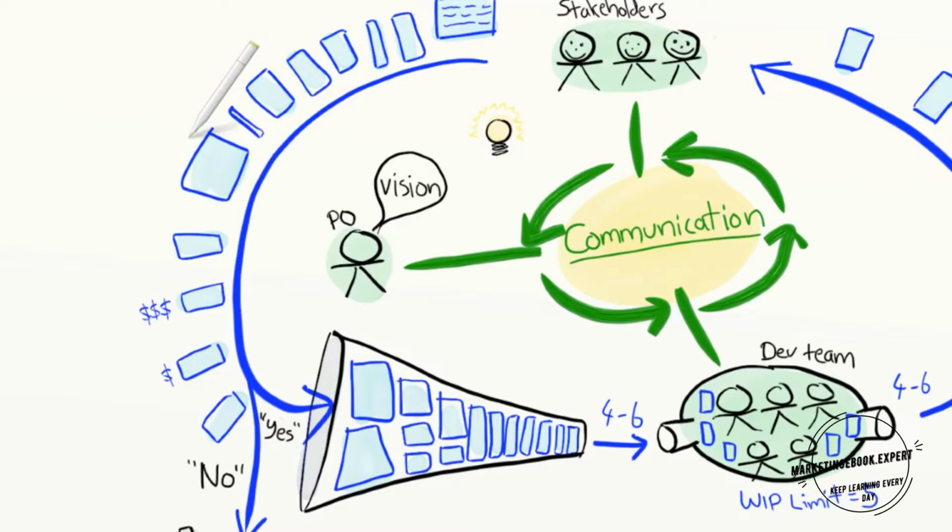Think of any system that you've used, and I bet you can think of at least one really simple feature that is very important, that you use every day. And I bet you can think of at least one huge complicated feature that is totally unimportant. Value and size is what helps Pat prioritize intelligently. Like here, these two stories are roughly the same size, but have different value. So build this one first. And over here, these two stories have roughly the same value, but different size. So build this one first, and so on.